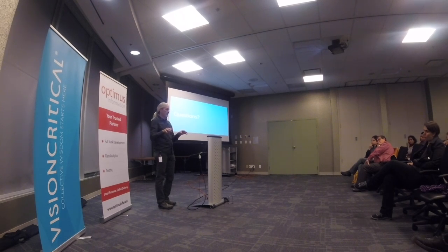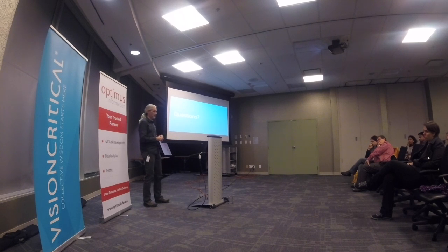So if you got to the end of that week and didn't manage to finish your high priority risk areas, I would definitely say you're not done. I would also say that you can tell before you get to that point that you're not going to get there. So talk to your team and your manager and say, I need more time because I haven't even been able to cover the high risk areas.